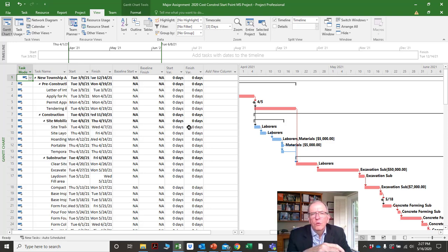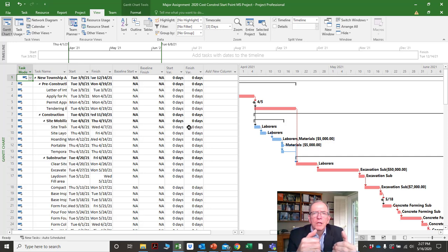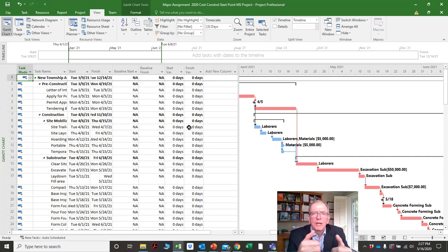Once you see where you are, the next step is: do we have to work weekends, bring in more resources, or tell the client the project's going to be delayed? At least you have that accurate information to decide how you want to proceed.